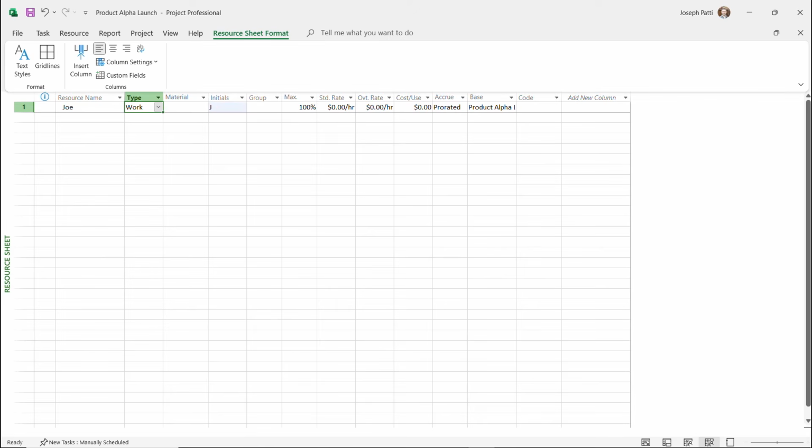I'll say work. You'll see the initials automatically populate. I'll say that I'm working on this project 100% of the time, which means 8 hours a day, every single time that we're working on something. Standard rate for me, I don't know, you can make it up. I'm just going to put that I make on this project $50 an hour. No overtime, we won't worry about that.